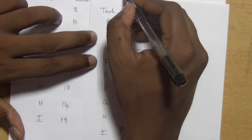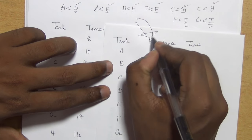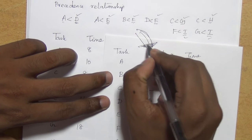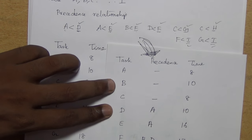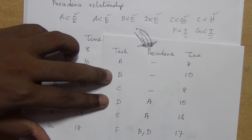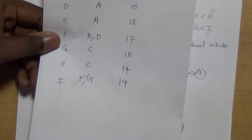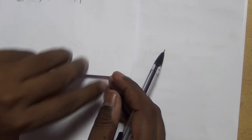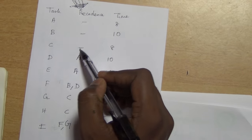So now the given data is converted to this tabular form. Using this data we are going to draw the activity diagram and also we are going to solve this CPM. We need to draw the network diagram for this. A, B, C are the activities that don't have any predecessor so we can directly draw these first.